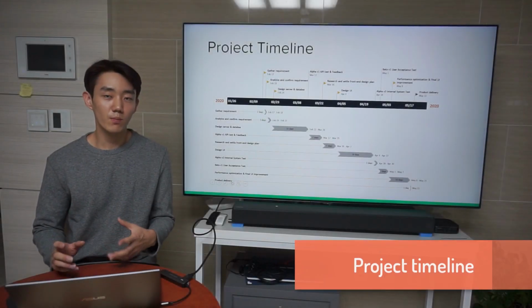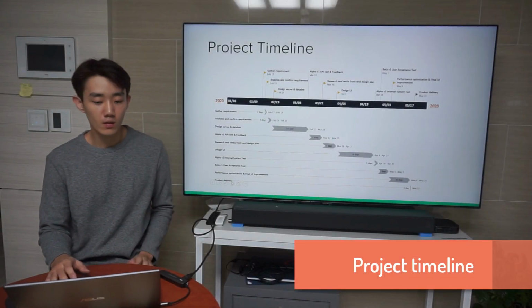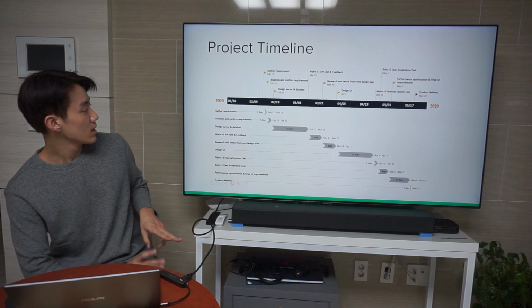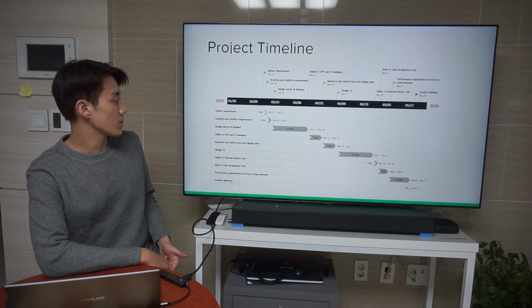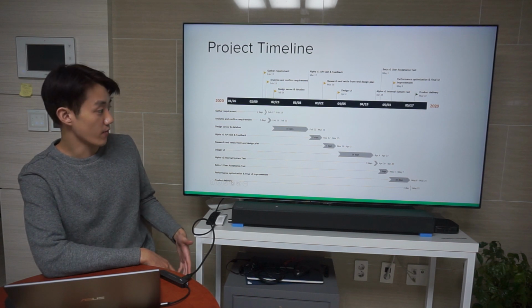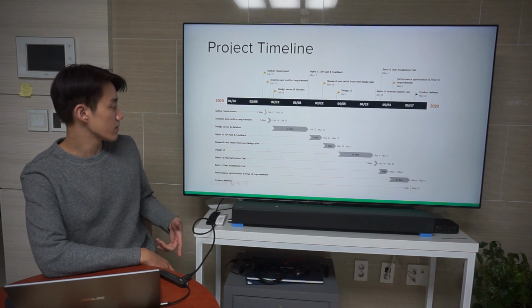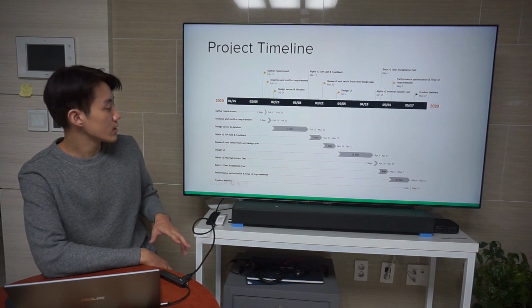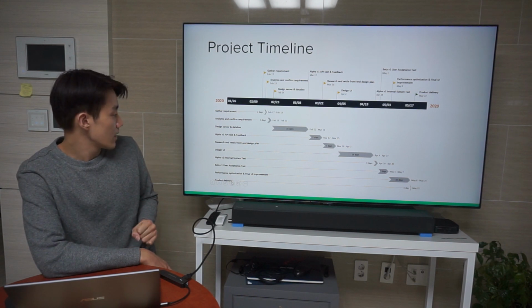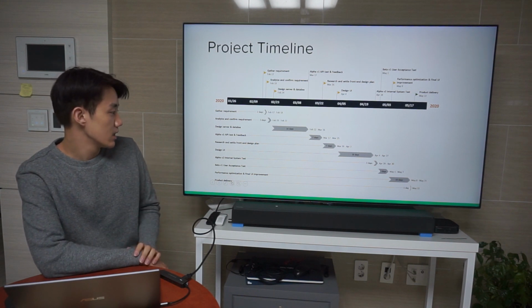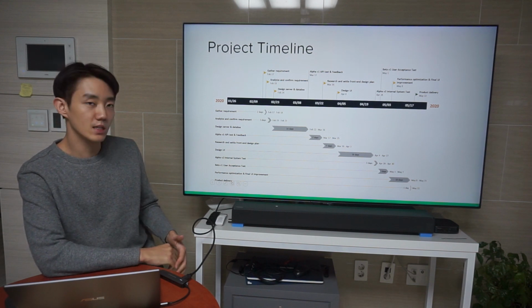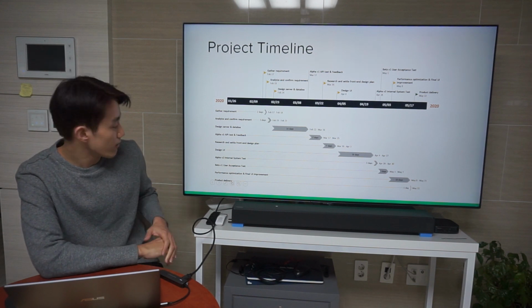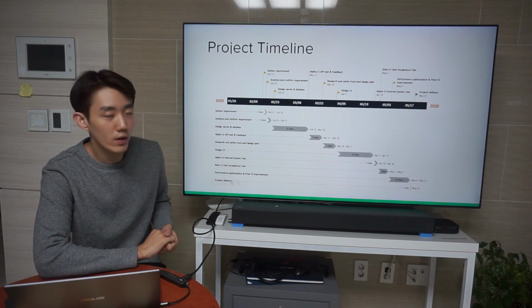Project timeline is planned based on semester 1 2020: 2 days on gathering requirements, 3 days for analyzing and confirming requirements, 16 days for designing server and database, 7 days for API test and feedback, 7 days for research and settling front-end design plan, and roughly 2 weeks for designing UI, and then 3 days for internal system test, 5 days for user acceptance test, and 10 days for performance optimization and final UI improvement. And finally, project delivery on 22nd of May.